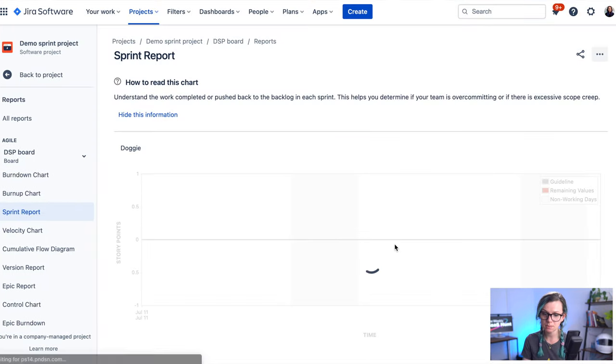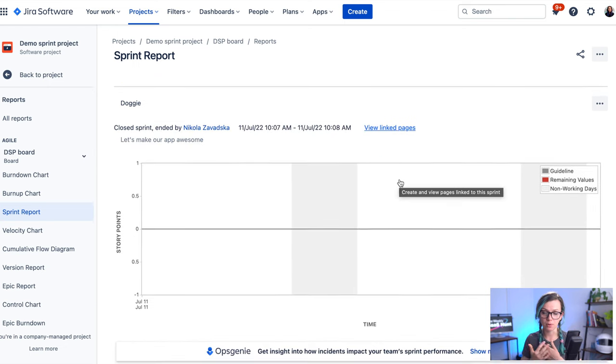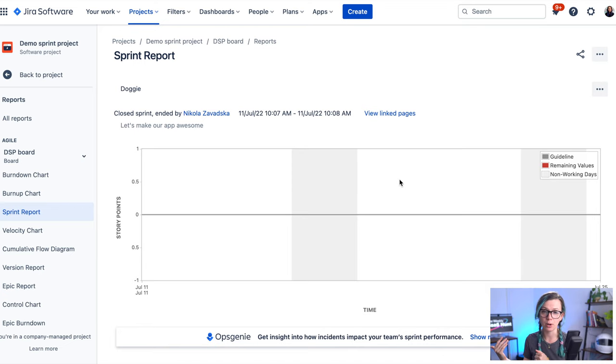So if you complete the sprint, then you are taken to the sprint report screen where you can see how the story points were burned over the time.